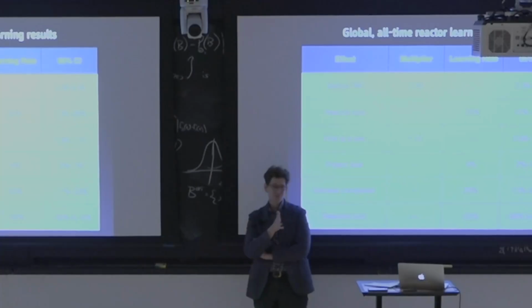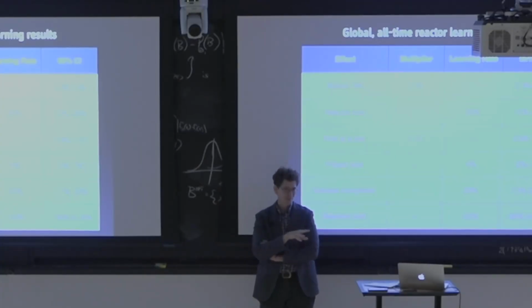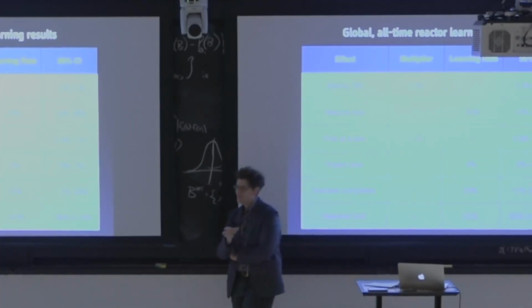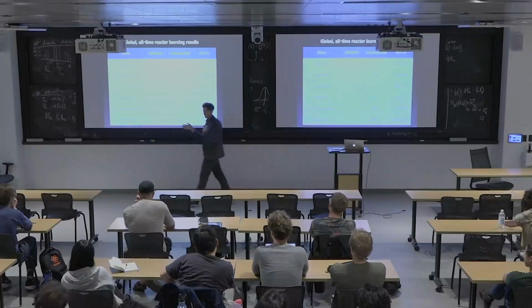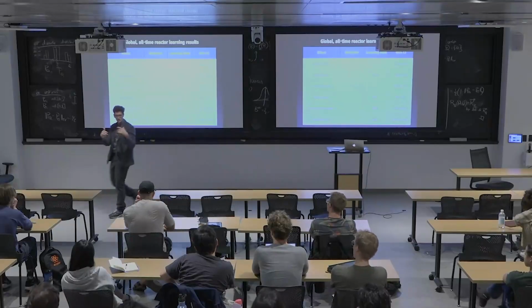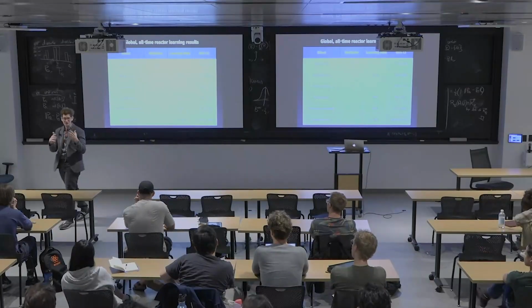And so this is what happened in part with the Vogtle design. There were something like of order 100 license modifications during the construction. And it's not a surprise that delays everything and pushes up the price. So we have not yet figured out how to modify stick-built construction to make it so that this won't happen.